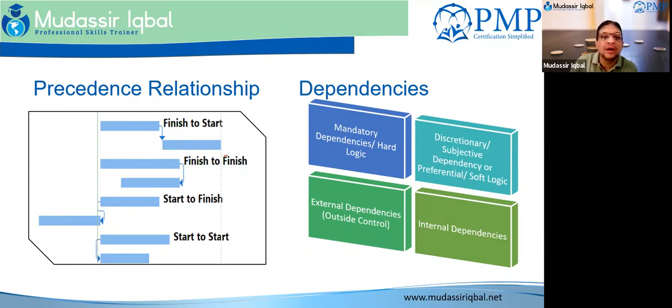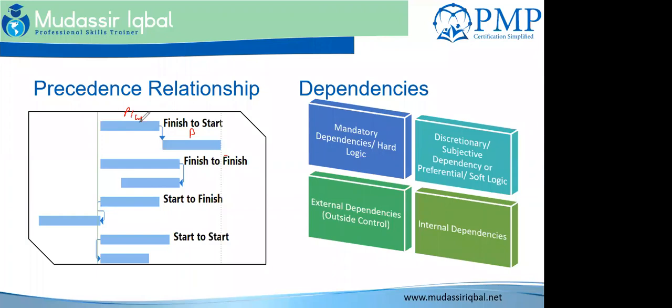That is your finish to start. You cannot start painting before your plaster is done. What is finish to finish? What is finish to finish? It means both tasks finish at the same time.